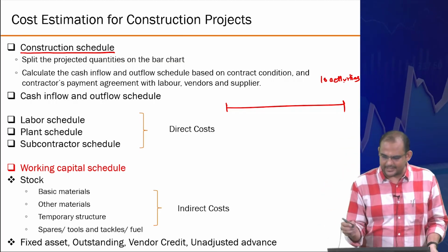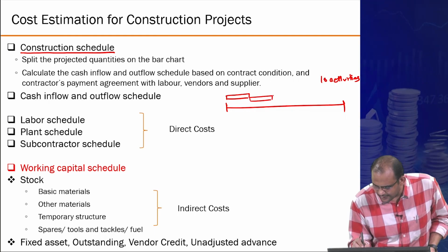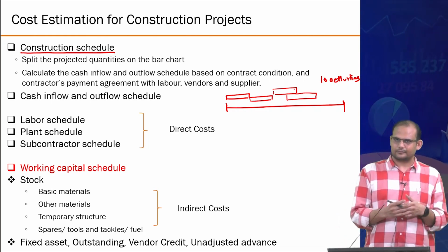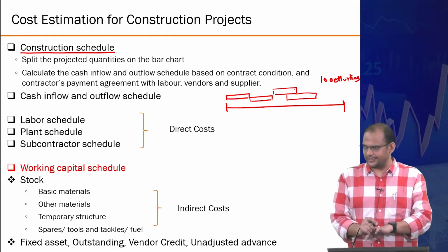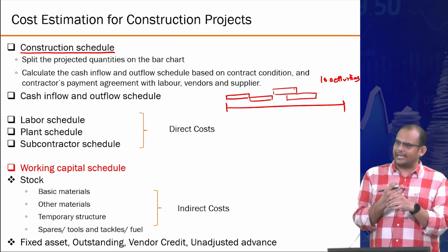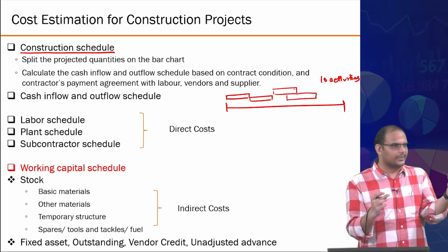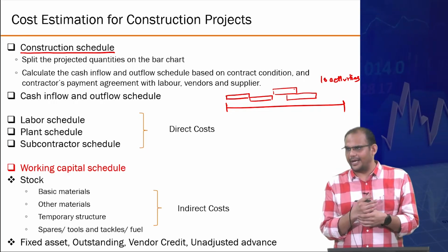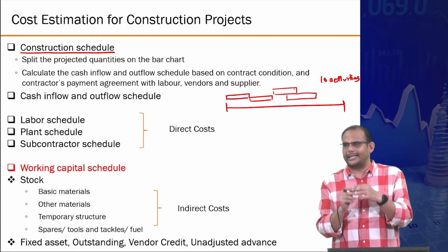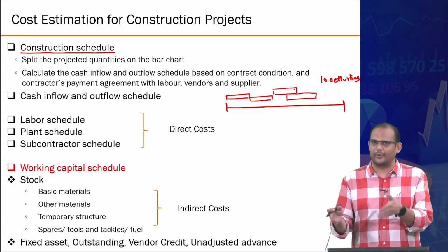So because of that, you have some diagrams showing how different activities are distributed over time, right? And this is very essential information, because once you know the activity, then corresponding to the quantity of that activity, you can estimate how many resources you will require, in order to do this much activity in this much time, and at what time, right? Resources could be materials, labor, equipment, machinery, whatever. But essentially, this is a fundamental backbone for calculating that.